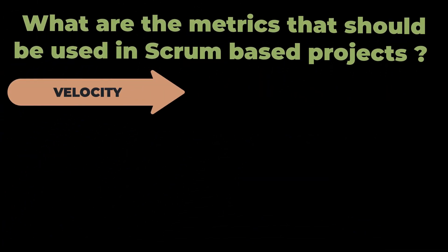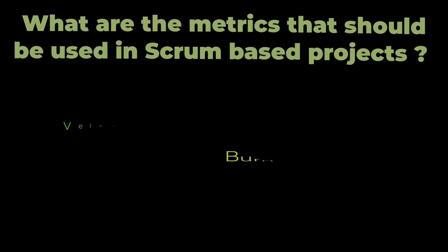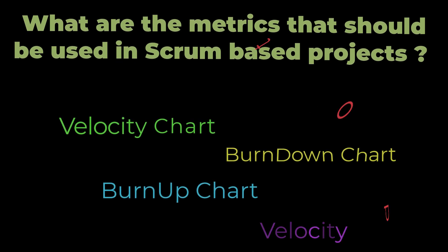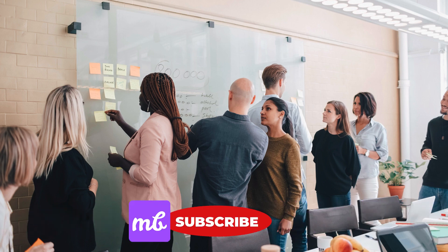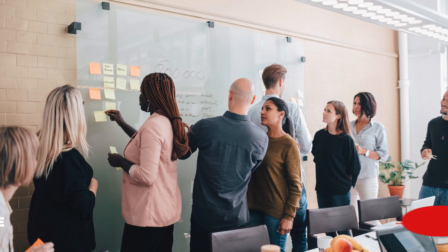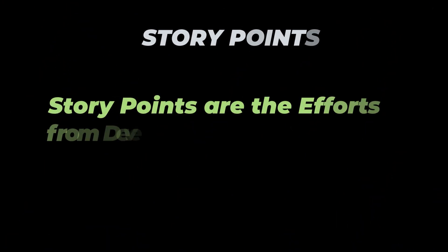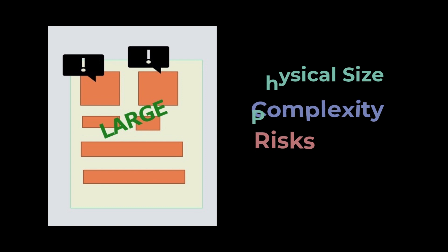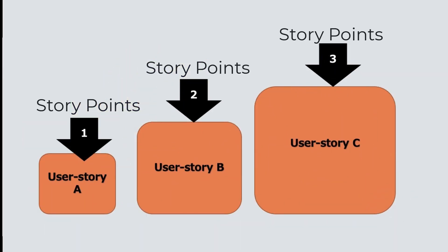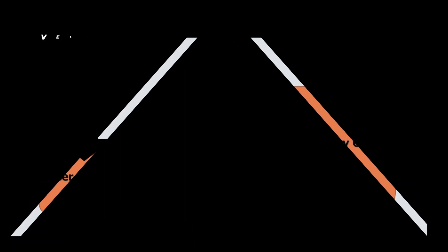We will be discussing velocity, velocity charts, burndown charts, and burn up charts. Before starting our major topics, let's talk a little about story points. Every team needs a unit of measurement to measure how big or complex a particular work is, so that they can determine estimates for that work. Story points are efforts from the development team's perspective to fully implement a particular piece of work. Story points measure the size of a product backlog item, defined by factors like how big the work is, the complexity, physical size, and the risks involved. Story points are the relative units of measure required to say that a work item is done.